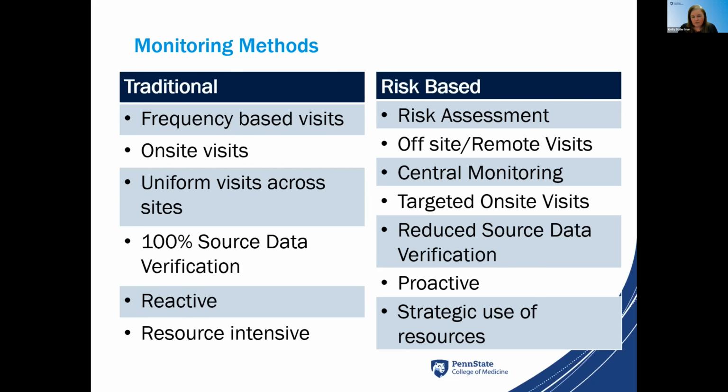And there are several different approaches to monitoring that can be taken to incorporate into the monitoring plan. And those are off-site remote visits, central monitoring, targeted on-site visits, a reduction in source data verification, and in total, this is a more proactive approach to prevent risks from occurring and is a more strategic use of resources.